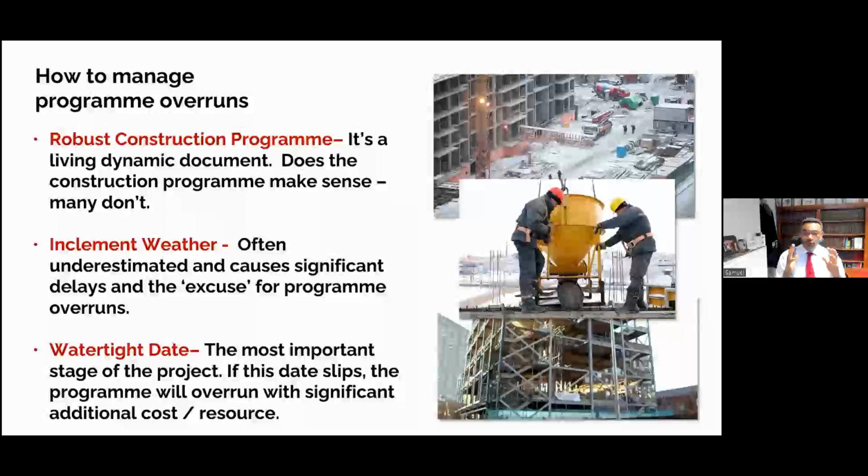So if you have your project construction program adequately done, and if you're the contractor, give it to the employer, give it to the architect, give it to your trade contractors, ask for comment on it, invite people to look at it and confirm that what you're allocating for them to do, they can do within that period of time.